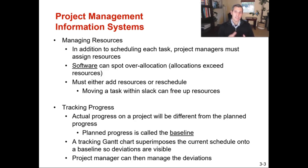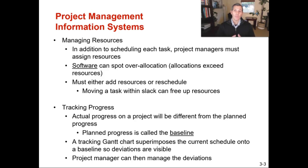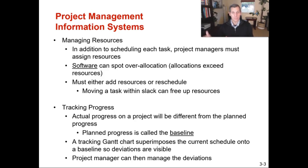In addition to scheduling each task, project managers can assign resources to each task. The software will spot over-allocation to individual resources. So if Brent is assigned to multiple activities — activity A taking eight hours and activity B taking 20 hours — it will spot when Brent is over-allocated. These systems can also determine over-allocation for costs. It's great for tracking costs to see if we're on track for both timing and our costs.